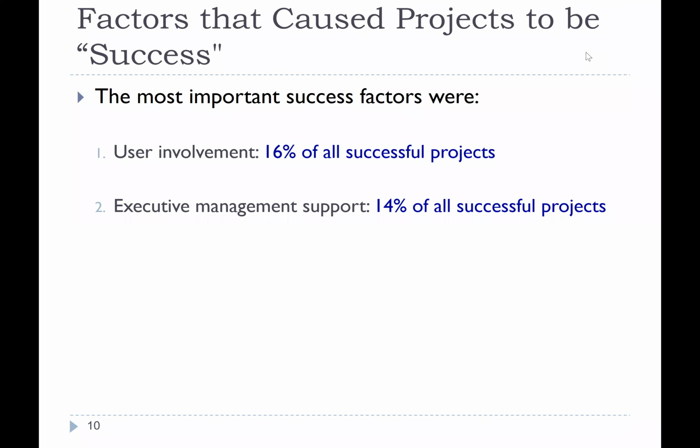So I would come in, I'm a bidder, and I know in my heart of hearts that this project would need 1 year, maybe 1 million reals to complete. I would say I'll finish it in 6 months, 500,000 reals. Completely lowballing the entire industry, the entire competition. You know what lowballing is? Lowballing is when you make a bid that is so much lower than everybody else's that you completely take all the attention and there's no way that the person awarding the project can pick somebody else other than you.